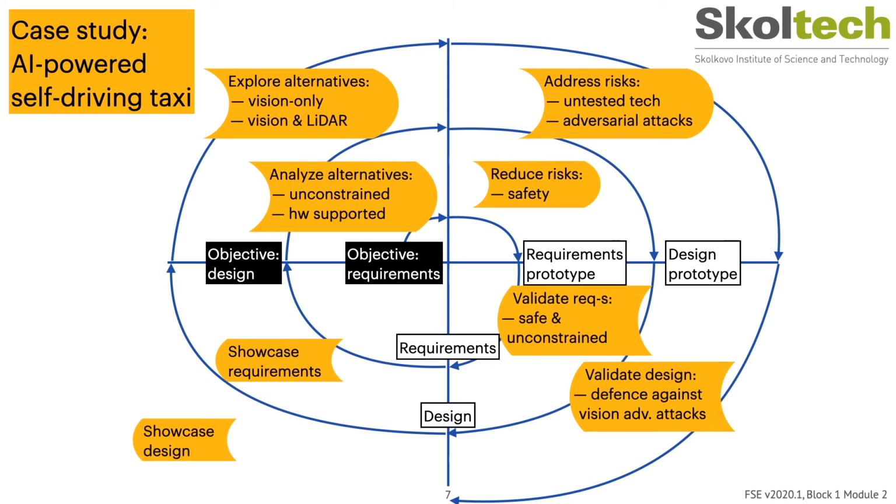The final trip around the spiral drives the application's implementation. The team evaluates implementation alternatives, even though they are probably used to a particular development approach already. They identify risks, perhaps previous projects had bad performance issues, and resolve them, like having more code reviews. The team then builds an operational prototype that shows how the program will work.